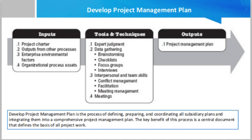Additional core components include: the chosen project lifecycle and related project phases, how the selected processes will be used to manage the specific project, how work will be executed to achieve project objectives, how changes will be monitored and controlled, how configuration management will be performed, how project management baselines will be maintained, communication techniques among stakeholders, and when management reviews will be scheduled to address issues and pending decisions.